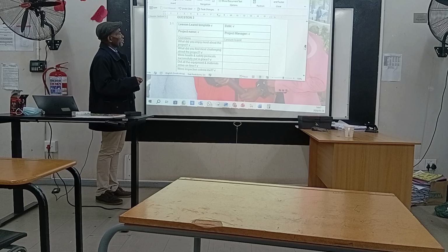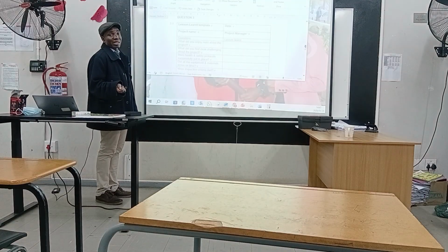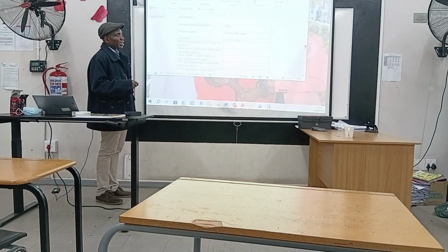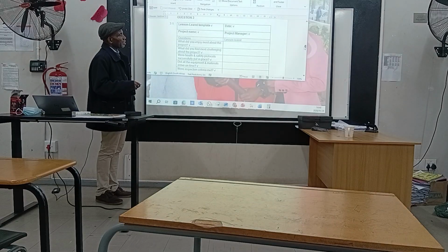So it goes like this. Then there must be a date on which the lessons learned template was compiled. Then the project manager's name, of course, must be there. Then the project name, of course, has to be there. Then these are some of the questions that can be posed in the compilation of a lessons learned template. For example, what did you enjoy most about the project?